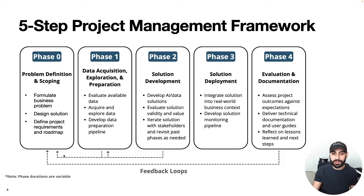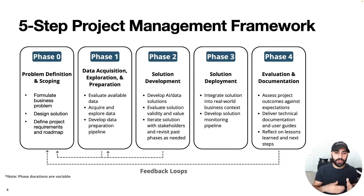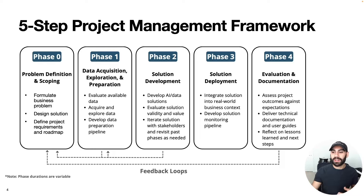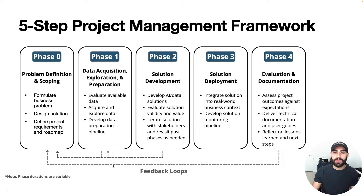Another feedback loop is from phase two back to phase zero. The data may be properly preprocessed, but the predictive performance still may not be as good as the existing solution — requiring you to go back to phase zero and reassess the solution design, asking if there's a better way to solve the problem. The final feedback loop is if everything goes according to plan and value is generated. No project is ever complete, there are always opportunities for improvement, and you'd return to phase zero to start building a broader solution.